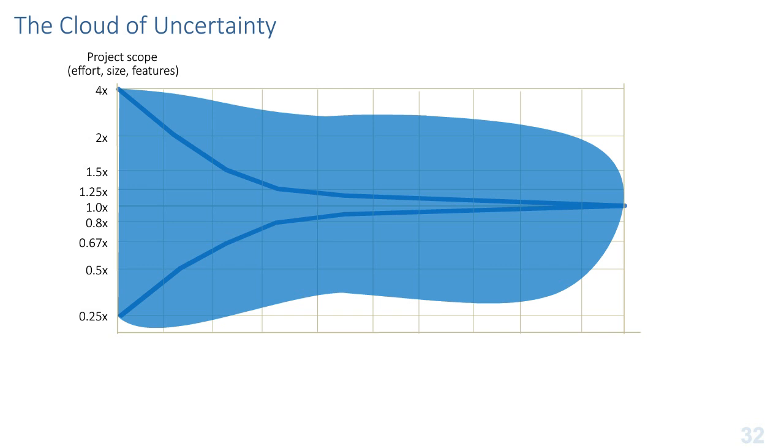So it's pretty clear that the cone of uncertainty is not a guarantee of improved accuracy. It's more of a prospect than a promise, and it's easy to run a project so that we get more of a cloud of uncertainty than a cone of uncertainty. I would say literally hundreds or thousands of projects prove that every single day. We have all kinds of examples of projects running according to a cloud of uncertainty. And the reason for that is that the variability doesn't reduce itself.